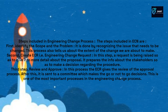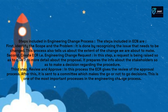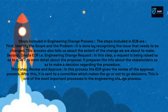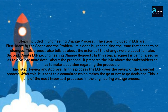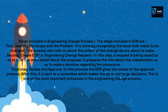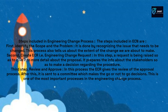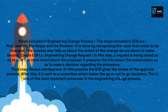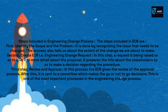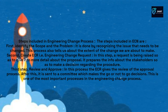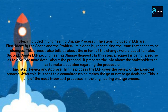The second step is to create an ECR — Engineering Change Request. In this step, a request is raised so as to dive into more detail about the proposal. It prepares the info about the stakeholders so as to make a decision regarding the procedure.